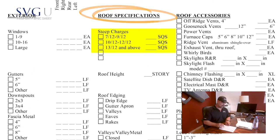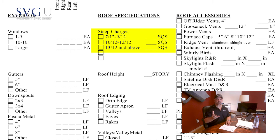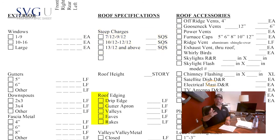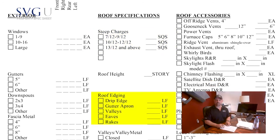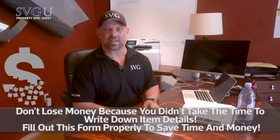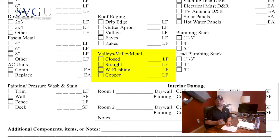You also have your roof specs and your steep charges. Eagle View picks some of that up, but it's not going to get the details, and sometimes Eagle Views are wrong. We have drip edge — what kind is it? Is it copper? The house we're going to go on today has copper drip edge. If you didn't write that down and they wrote it for regular drip edge, you could lose up to $28 a linear foot. These are very important things while you're scoping out the house. What type of valley? Is it closed? Is it W's? Is it copper valleys? You can't see that from a satellite. Just take a few minutes on that roof inspection and check the boxes — you don't have to be an estimate writer, but check the right boxes so whoever's writing that estimate at the office can write a proper one.